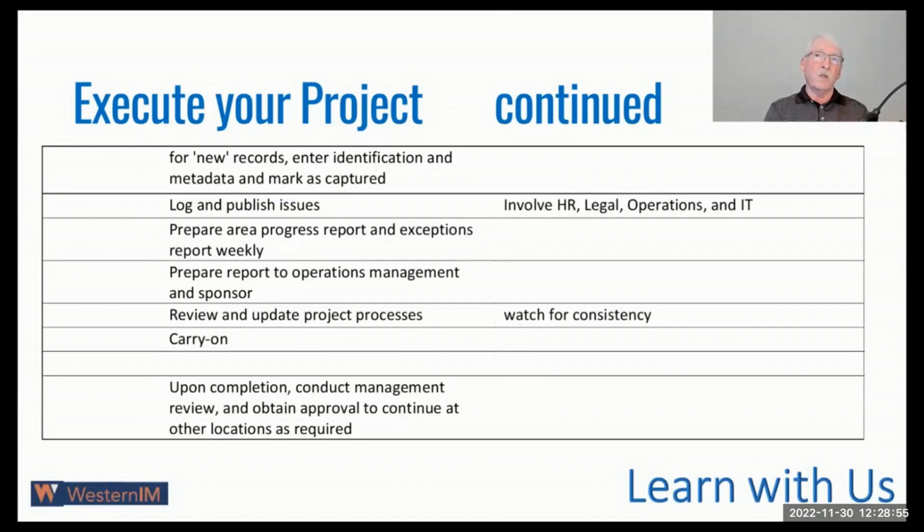So we're assuming that you've done one location now and you're going to move on to another location as part of this larger project that you're doing. And in our case, for the project we talked about, it was 115 locations. So it was important to finish one off, get everything under control, and then get approval to move on to the next location. Brian, comments on that and conclusions on the tasks of execution of the project?